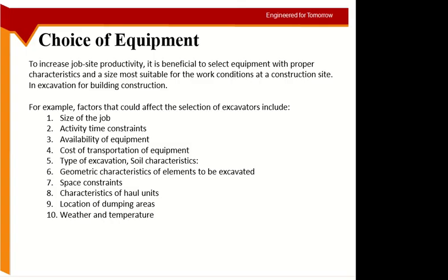So the equipment I need is coming from where? Again, there could be a case where I have the equipment, but right now it is working on a project in Saudi Arabia. So I want to bring it here. So you have the toll and you have the permission and everything. So from where you are bringing the equipment? If you are going to buy a new one for this project because you feel you will use it in the future as well, then the lead time could be even higher.